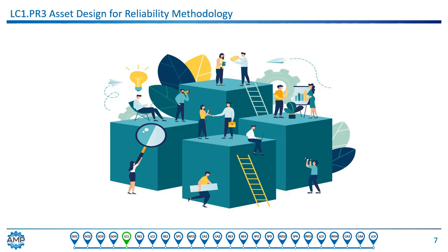Design for reliability should therefore be integrated into the asset acquisition project processes and verified during project stage gate reviews. When projects are being designed, there should be discussion and consensus around this topic. The more critical the project, the more attention should be paid to making sure the project is tracking on design for reliability. To ensure accurate results, asset end users and maintainers must be involved in DFR reviews and be part of the stage gate process.